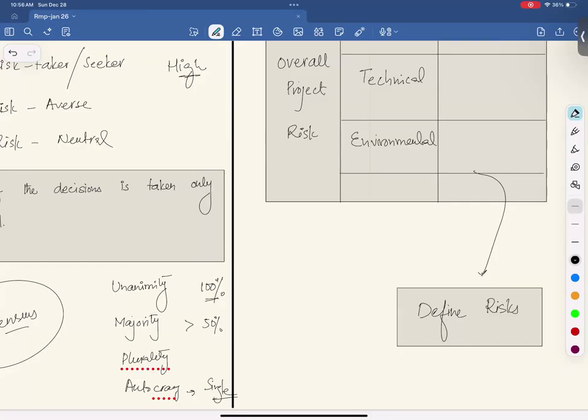Yeah, it's a guide. It varies from project to project. There is no standard for that. You can use Spectrum, you can use PESTLE, you can use VUCA. There are different schemes that you can use, and you can use random as well. For example, if I'm doing risk assessment, I can do student related risks, PMI related risks, teacher related risk, content related risk, technology related risk.